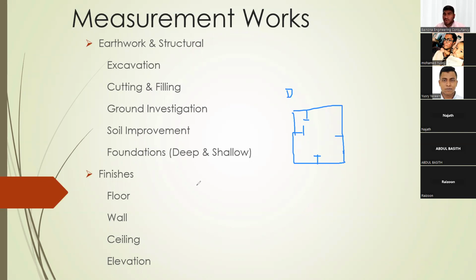So you all know that the building is designed first. You know that the engineer, the one we talk about, is designing the building. During his design, what he should do is prepare a concept design in the beginning. The first stage of the building project phase starts with the concept design. You will see it in another subject, but just remember that first is concept design. Second is schematic design, we call it scheme design. Third is detail design. And fourth comes tender. So the fourth stage is tender.